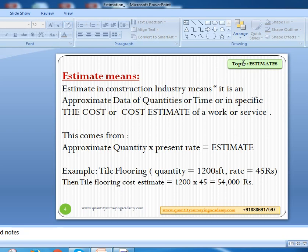In simple terms, approximate quantity multiplied by the present rate will give you the estimate. To get an estimate, two components are needed: the quantity and the present rate when you are doing the estimate. The quantity can be taken from the given drawing or from existing sites, whether new or old. Then you apply the present rate — quantity into rate gives you the estimate.